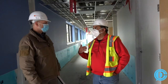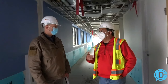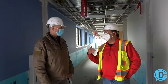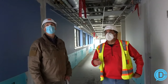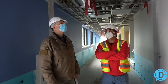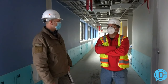They'll start to break things down and separate it. We'll move the ceiling tile out of the building. We'll have a couple storage containers delivered tomorrow. We'll move some of the ship loose out that we're not going to use for a while. Right. Flooring, ceiling tile, we'll just get that out of the way. Yep. Like I said, we already have roofing scheduled and exterior caulking scheduled for Friday. We'll start that work. The touch-up where all the structural bolt connections were made, and we have to do some fire spray touch-up, that'll be scheduled for next week. Right. We want to get that done before we start closing things up.